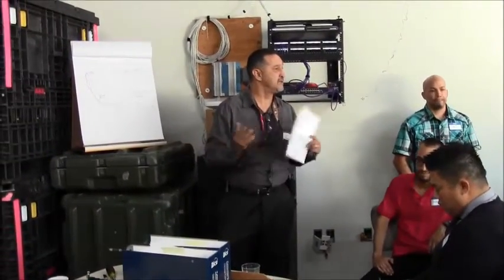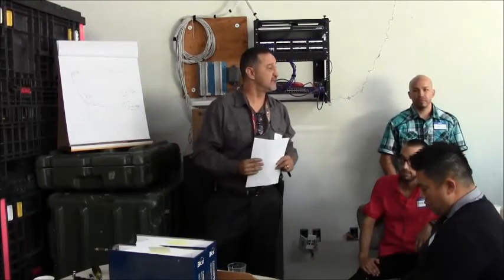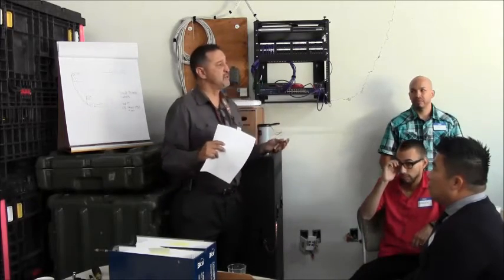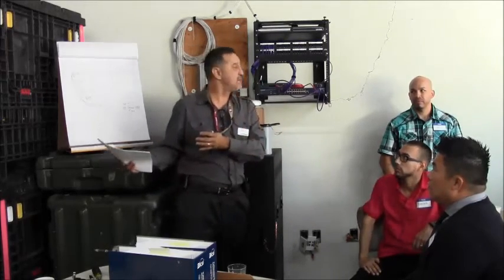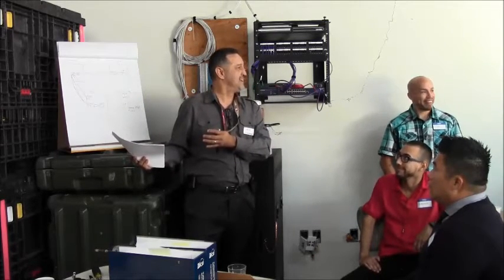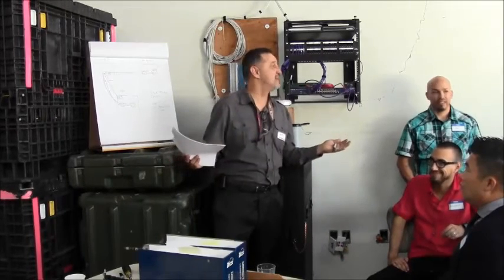And then not only that, in February after the Super Bowl, we got 1 week to demo it. And it's a $10 million project that's going to be demoed after the project. That's a lot of money to throw away. So part of my contract was, yeah, we'll do it, we'll give you a good rate, but can we keep the cable after and demo it and scrap it, and so we could have a party? And he's like, yeah, you can take the cable, because they don't want it. So I threw that in the bid. I guarantee you, I'm going to make a lot of money on that cable.